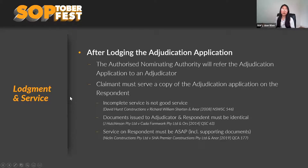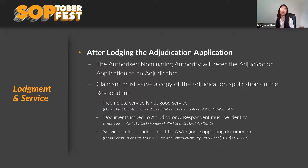Third: service on the respondent must be as soon as possible. In one case involving multiple adjudication applications, documents were hand-delivered but the claimant only realized the application wasn't in the correct form when the response came in. They re-served 12 business days later. The court held that even though they re-served, it didn't cure the original mistake — it goes to the intention of the Act for quick resolution of disputes.